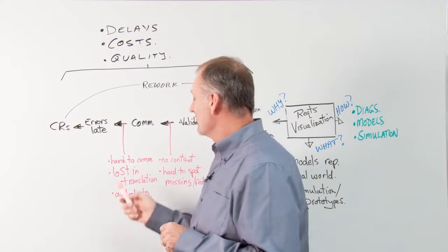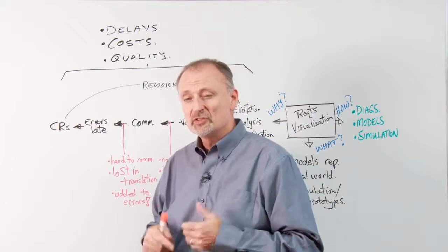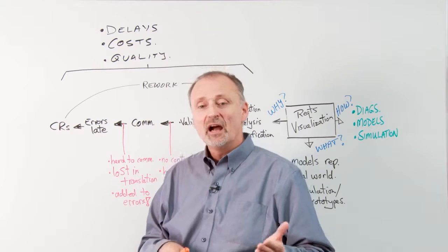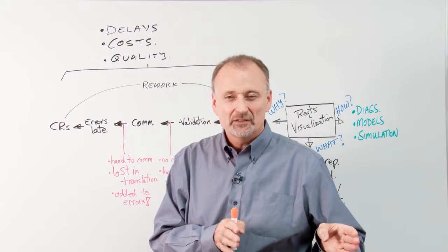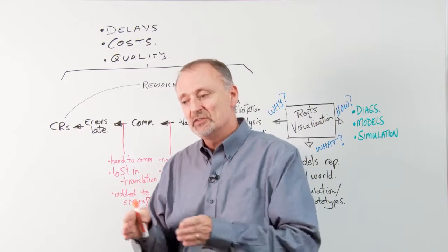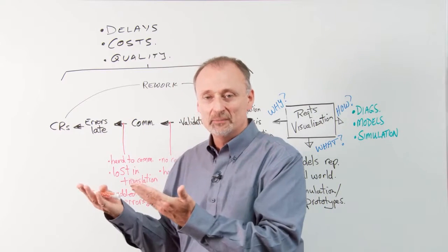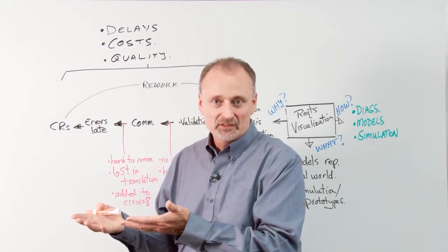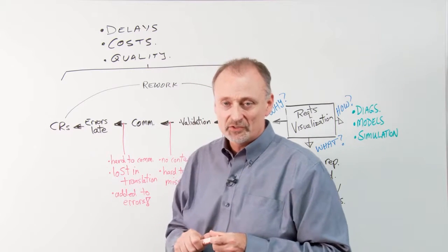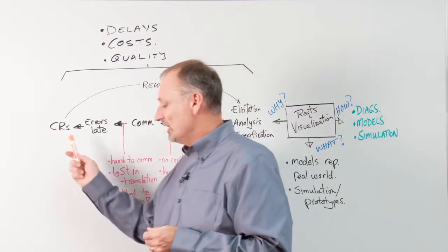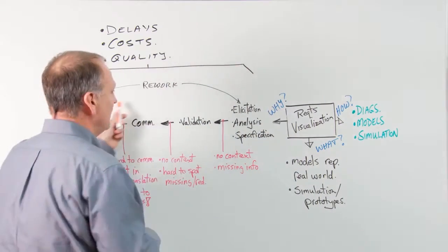requests, because these issues will be surfaced, and generally they're surfaced when we are able to visualize things, when that flat legal style text is actually translated into functioning code and we can see the application. That's when it gets exposed. That's when we see many of the errors. That's when all the change requests start to happen. And when we have change requests, we basically have rework.